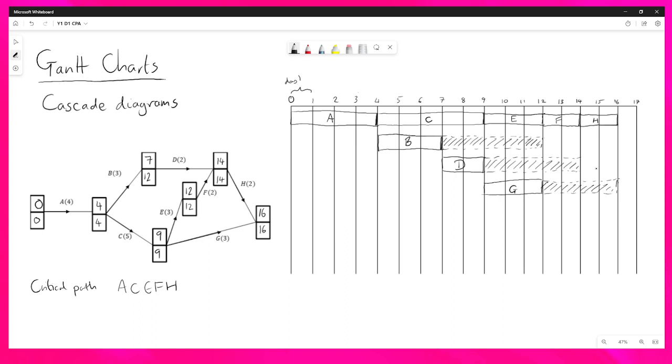You just draw the additional activities. So if A and H are in 2 critical paths, you don't draw A and H twice, you don't draw A and H double the size, you just draw them like we've done here, and then put any additional critical activities underneath. You still do them first though, and then do the rest of the non-critical activities.